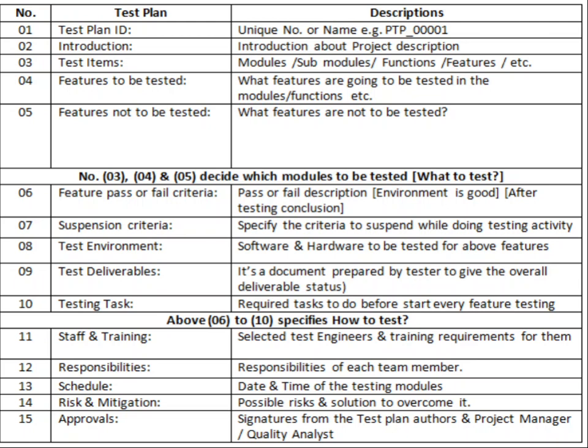It also defines what the different steps are for the testing operation, whether training is required for staff, the responsibilities of each team member, the schedule, risk and mitigation, and approval.